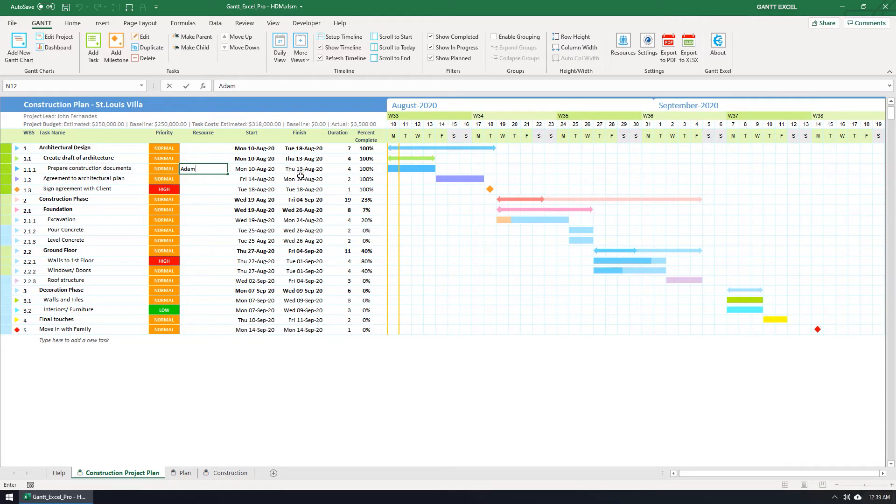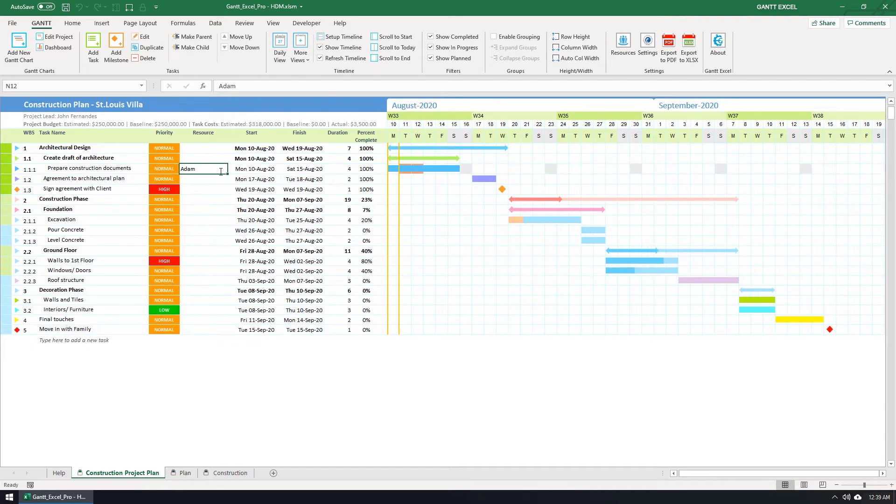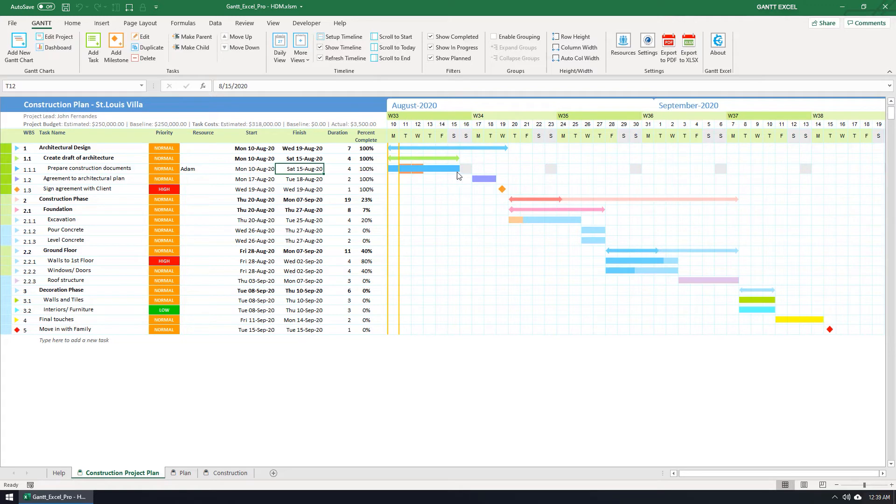Now observe the timeline bars as I hit the Enter key. You will see a few changes instantly. The task finish date changed from 13th August to 15th August as it now considers the two days of vacation and Saturday as a workday.